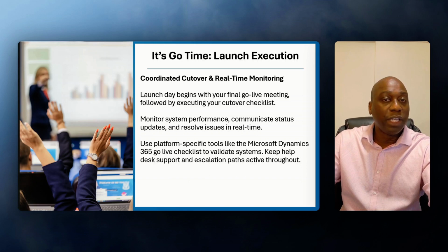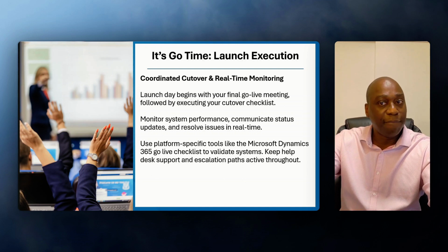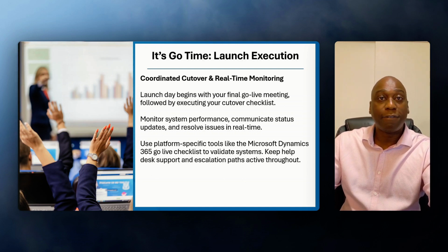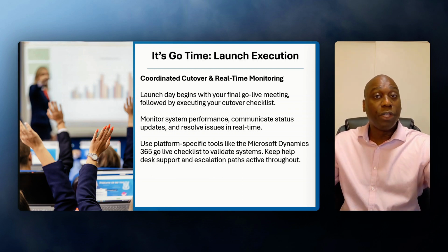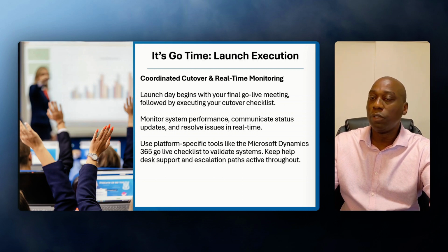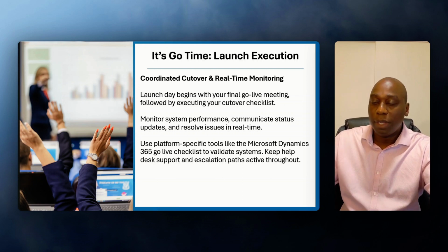The developers or the engineers that are pushing the code to the live system. We need the testers available to test things out on the live site when things have been rolled out. And so weekends are normally best for go live. That way, when Monday comes around and all the users show up in the morning, you don't run into a situation where things are just completely broken.